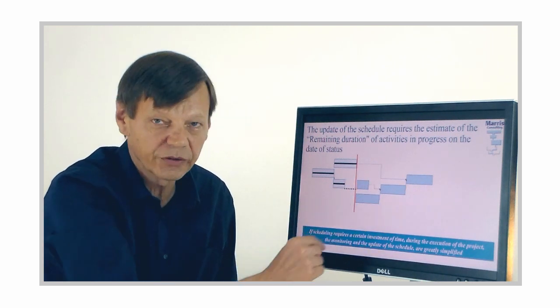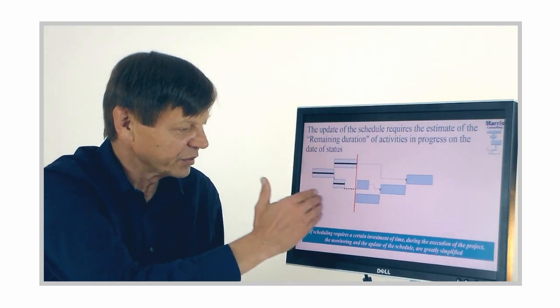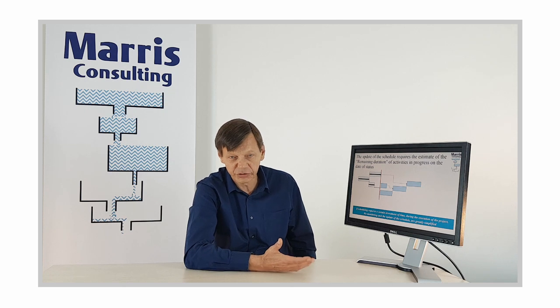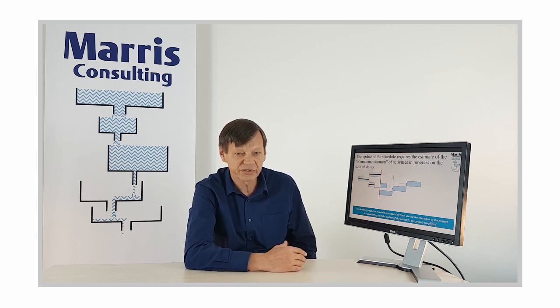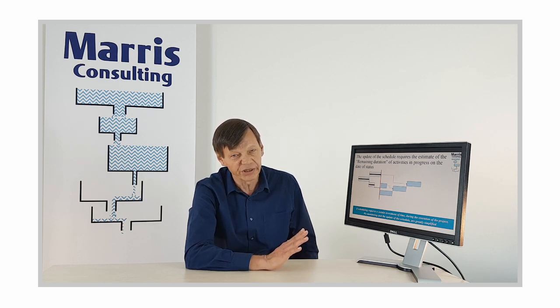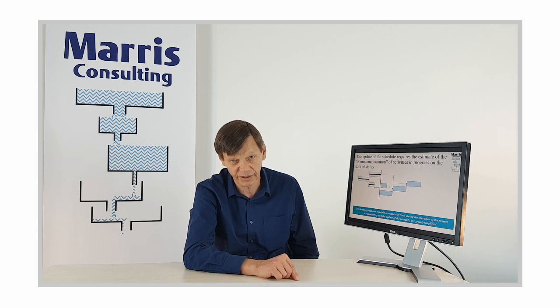And so forth. Okay? Updating that in this way using critical chain software is basically just a press of the button. To do this properly, you ask people to declare the work they've done. Yes, I finished that, and so forth. You're probably asking them how many hours or days they spent on the different projects, right? What was the time consumed? To do the critical chain monitoring properly, you also need to ask them what is the time remaining, okay? And that time remaining is not what is left over from the budget or the time allocated.